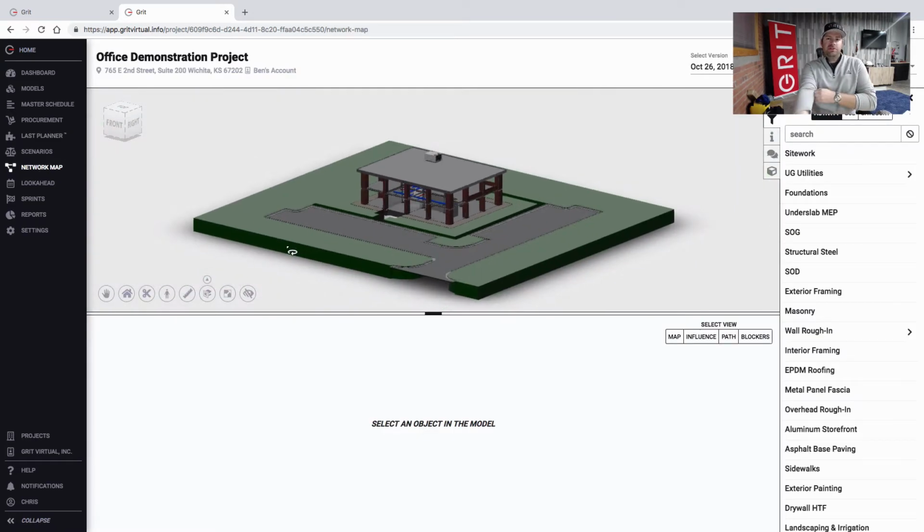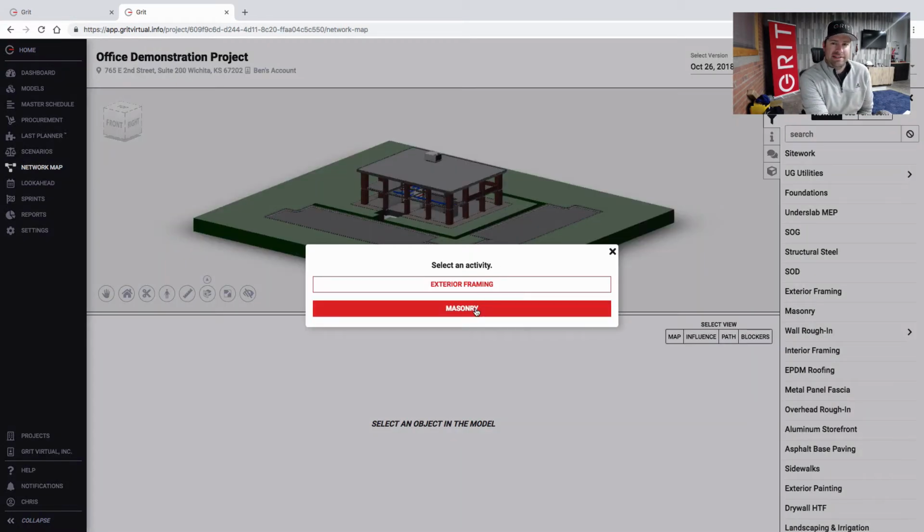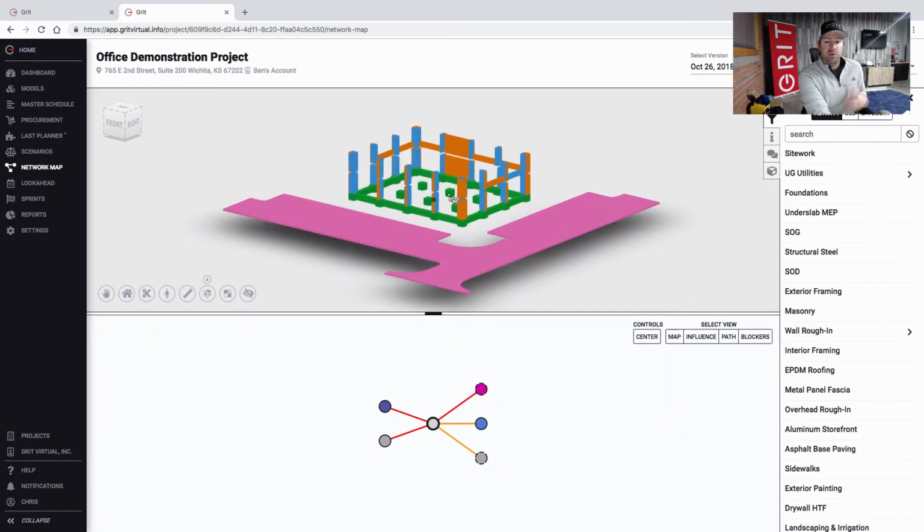Now, the system is going to look at this in a CPM, or critical path method, sense to understand what are the longest duration paths in the schedule, either based on activity data from the master schedule or task data from last planner input. Anytime that an activity has been completely tasked out, we understand that we can replace it with the multiple tasks rather than use the single activity. If we started out with a boulder and hit it with a pickaxe and now we have rocks, the rocks are what's created through that last planner input.